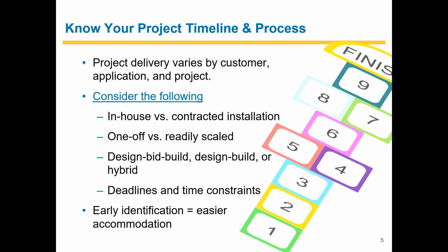Similarly, the contracting phase is always good. Often in lighting retrofits, it tends to be a design-build project where we're relying on the contractor to generally propose materials, and then once they get approval on the proposed materials, installing them. That is a very different approach than, say, using a design-bid-build where you have a designer on staff who's going to probably be a little bit more detail oriented on some of the visual aspects as opposed to maybe the efficiency aspects. So knowing those players and how they all work together is going to impact your project success.